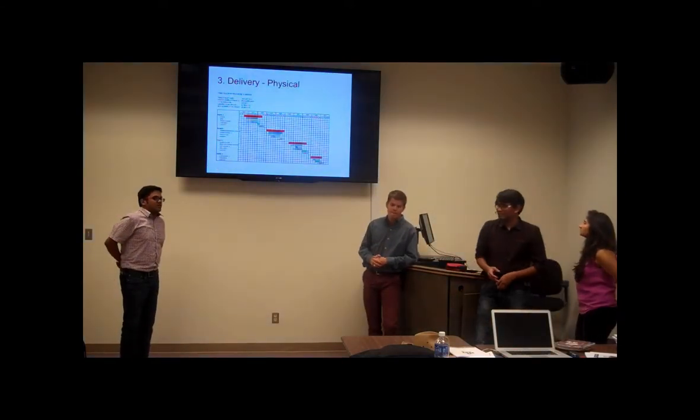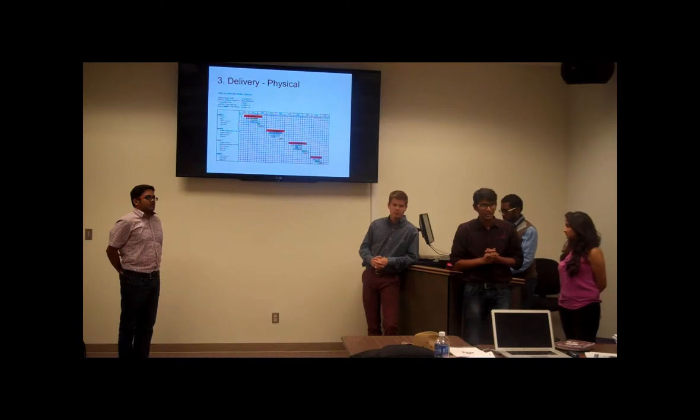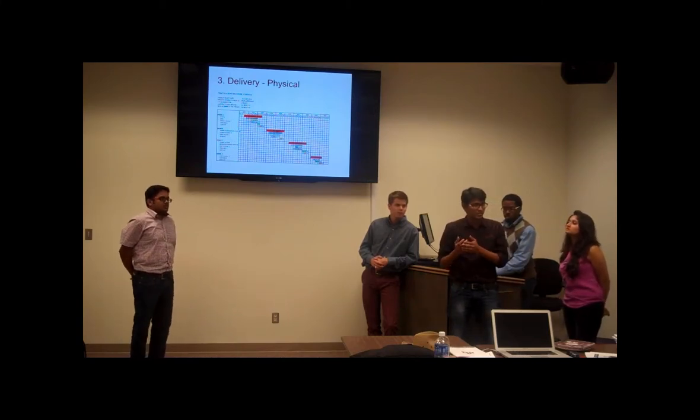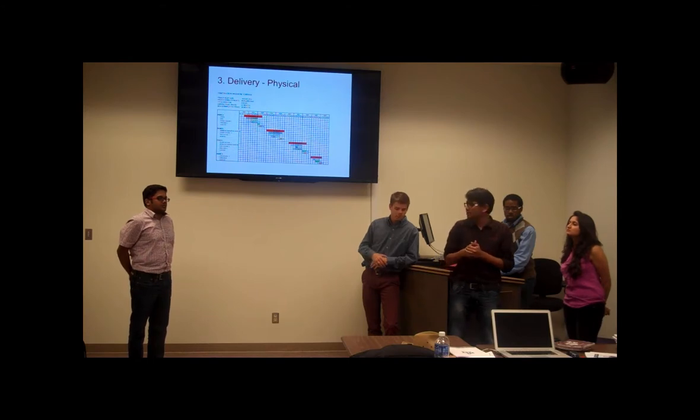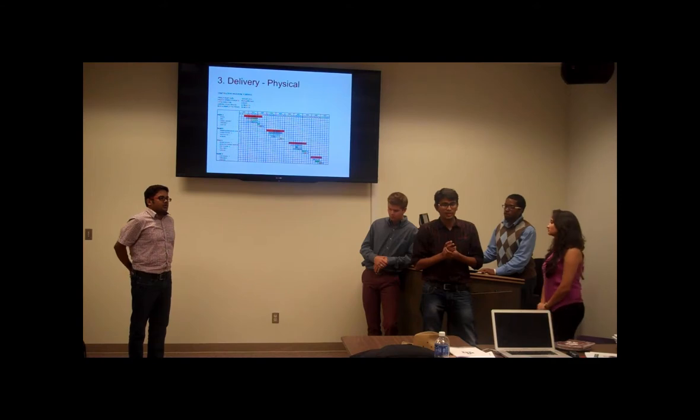Coming to the construction, we chose a project delivery method called design build bridging. We as an entity formed a bridging contracting company. Our architect and the owner will draft the 35% of the drawings and then hand it over to us. So we've developed a schedule for around 9 years, with each phase of around 24 months.